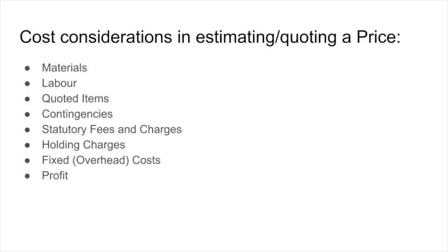So that means you're going to have to add $300 to that cost, and that $300 will constitute your profit, and it will come up with a price effectively of $1,300. So you say to me, Paul, it's going to cost you $1,300 in order to do this work. You make $300 out of it, $1,000 goes to the expenses of completing the work. Again, it requires a sit down and some consideration in terms of coming up with the estimate.